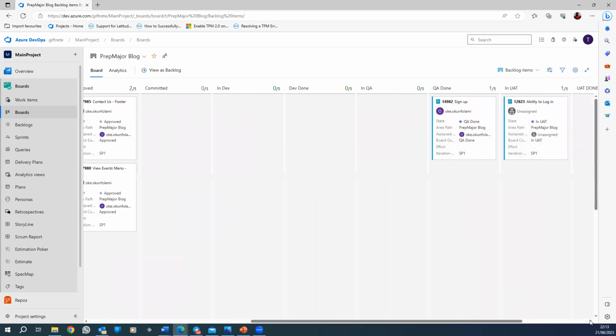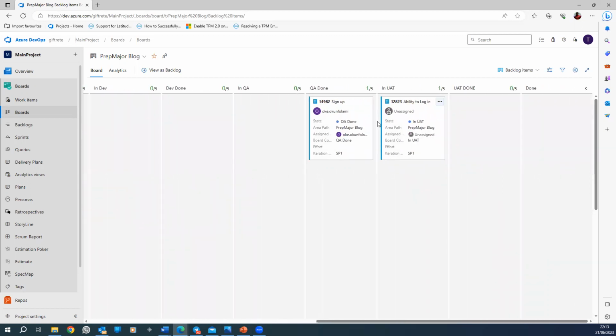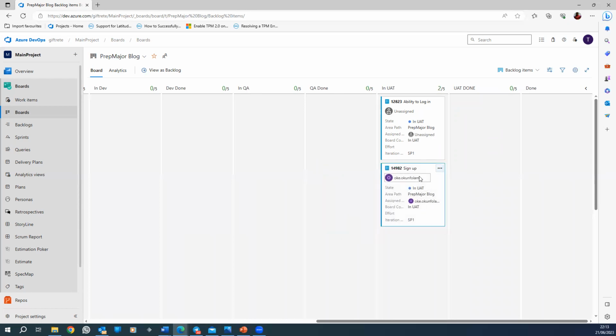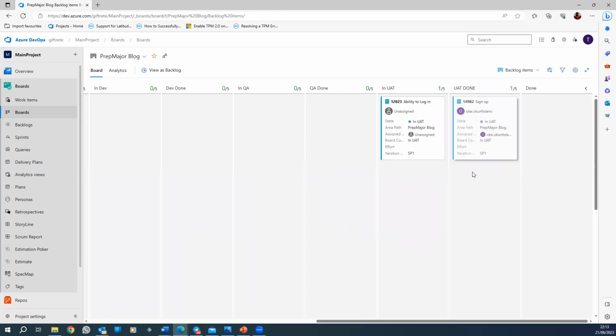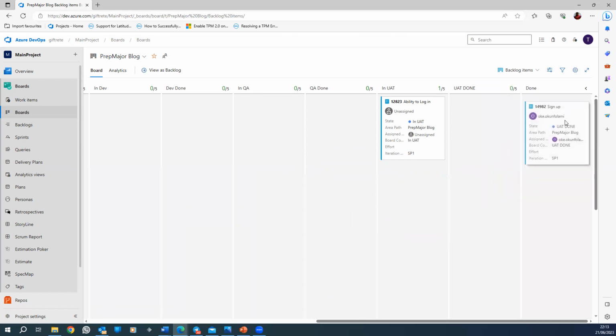There's still more. When they finish testing, it will sit in QA done. Then they will say, BA, we finished, so come and do your UAT. You will come and take it again. You do your UAT. When you're finished and you pass the UAT, you put it here, UAT done. In fact, once it's UAT done, the story is as good as done.